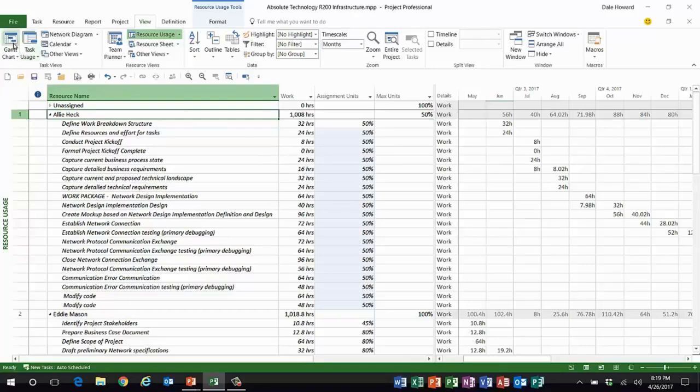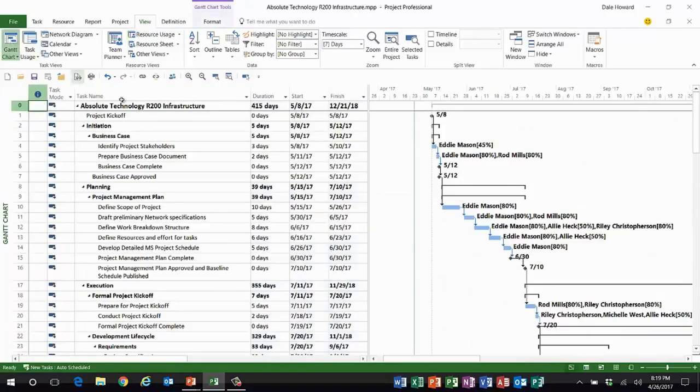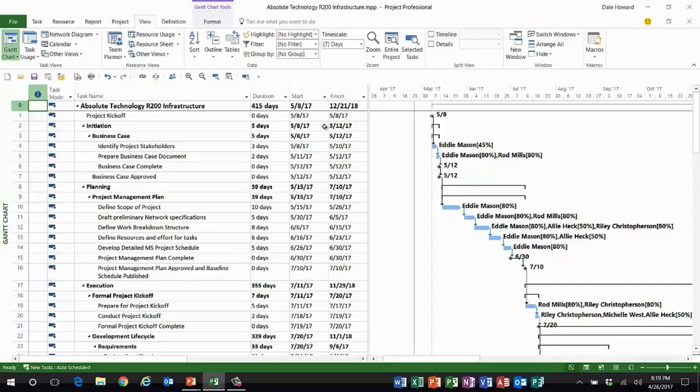So, if I go to the Gantt chart view, what I'll be able to see is the schedule has changed. The schedule slipped out quite a bit, several months, but that made easy work out of what would have been an otherwise very painful and arduous process.